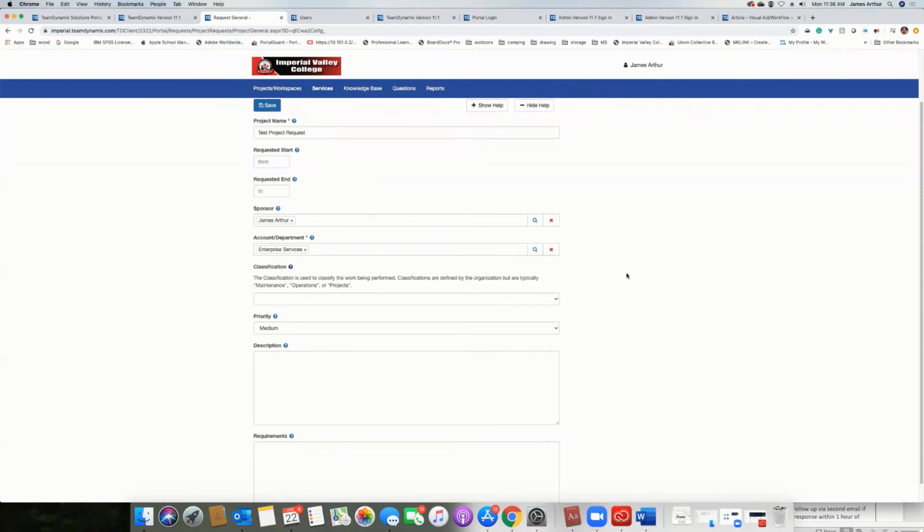Many people are. But the idea is over time, as your project management maturity increases, and by time, we're not talking months, we're talking a year, 2 years, 3 years, 5 years down the road, you're trying to get that mix inside those three areas to be leaning towards transformational more and running less, right? So if you start out 50 to 70% in run, 20 to 30% in grow, 10 to 20% in transform, hopefully three to 5 years down the road, your run is more in the 30 to 50, grow is in the 20 to 40, transform might be in the 30 to 40, right? And over time, you're sliding that spectrum so that you're doing more transformational type projects that are really helping out your whole organization.